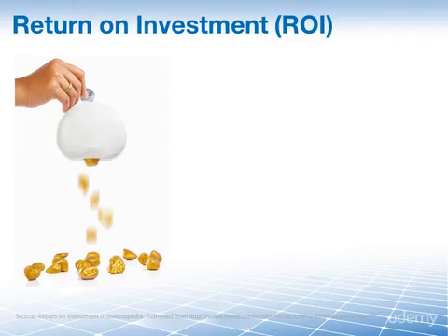But you can easily see that you really couldn't evaluate a project on payback period alone. Payback period is focused on when you can recoup your original investment. It doesn't care about anything that happens after that. For example, it doesn't consider profitability. This is where a metric like the return on investment, ROI, becomes useful.